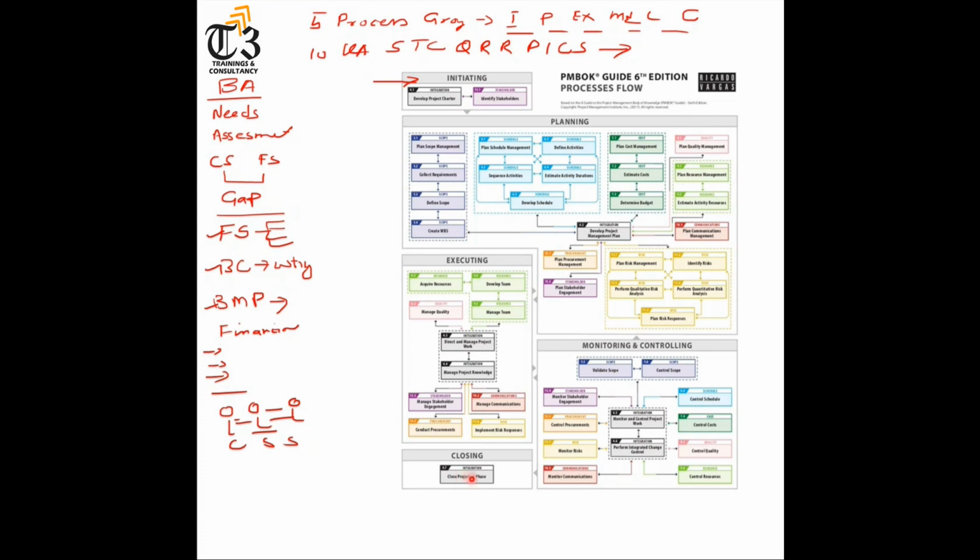If the project was terminated abnormally, you will hold a post-mortem meeting on why it happened, so you can avoid those things. And once all the work is finished, you have done the supplier evaluations, your evaluations, team evaluations, then everything will be uploaded to the lessons learned repository in the OPA. Once all the work is done, then you can release the team, and then you can release yourself from the project. And that is the whole project management framework according to PMI from start to end, what we have done in the last 3 days.